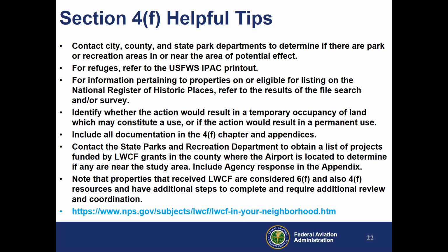And also, you're going to want to contact the State Park and Rec Department to obtain a list of land and water conservation grants that have been issued in the county where the airport is located. It used to be that we were able to go onto a website, but with the current administration, that has been removed. So we're not able to access that information. So you have to go through your State Park and Rec to get that list of conservation grants in the county where your project is.